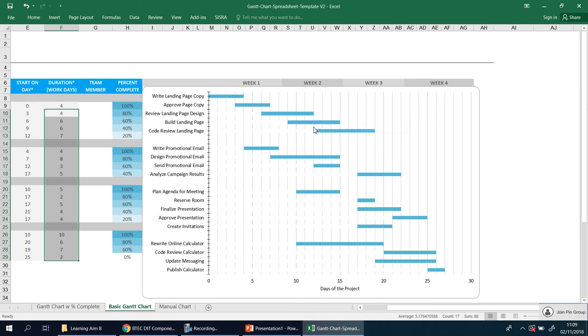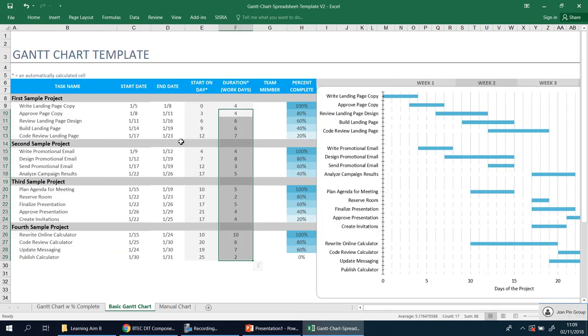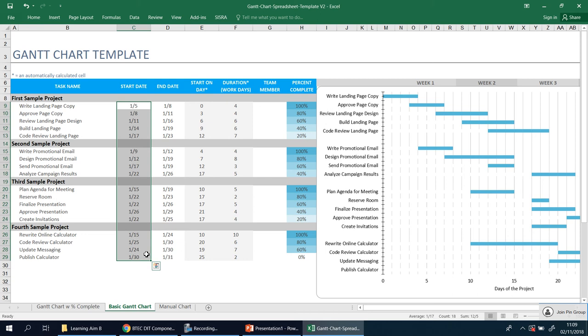By the 11th day you're already at the end of the third task but you're also halfway through the fourth task. And not only that, if you look down a little bit more, by the time you get to this point here you've also done another task down here. So there will be some multitasking involved if you put the dates in here properly because you'll see some things will happen before and after other things. It's not just all happening linear. What the word basic means is where you do one thing, the next one, the next one, and you're waiting for one thing to finish before you start. Yes, don't get me wrong, there'll be some activities you cannot start until something else has been done, but there will be others that you can do in the meantime.